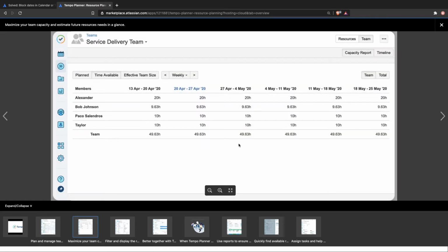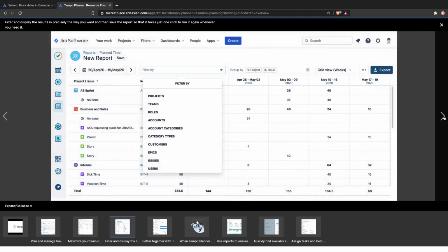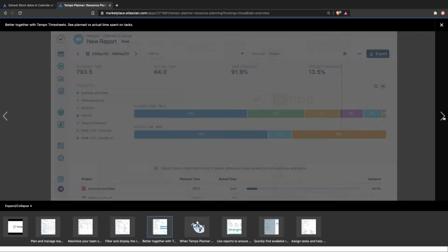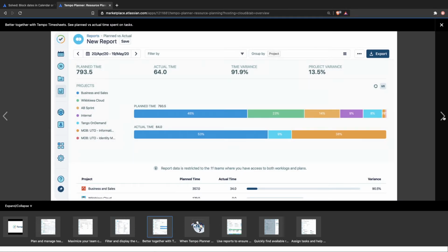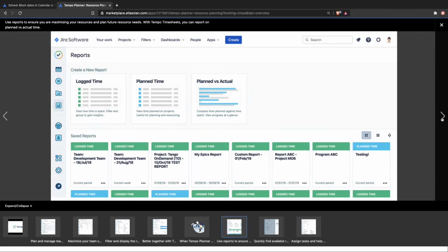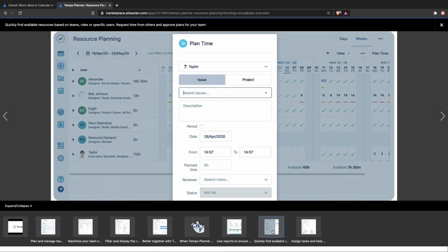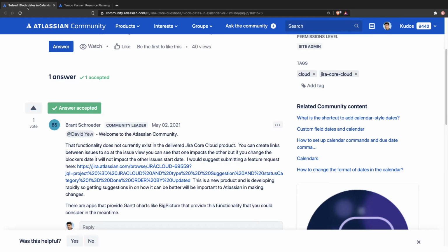You have the option to look at the availabilities, and it will let you do a lot of other things, and it works really well along with the timesheets. Timesheets is something that you can use if you want people to submit time, along with planning the work, because when you plan the work, it is for planning. You want to know when the person will be doing things, but when people actually start filling in their timesheets, then you can do a comparison of planned and actual work.